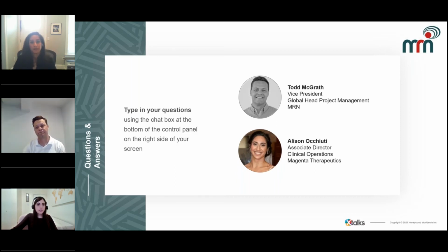A question that we have here for our speakers is: is reconsent required when decentralization services are integrated with an ongoing clinical trial? I can take that. If it's not already in your informed consent form, then yes, absolutely, reconsent would be required. And that's something we talked about earlier: that process is not instantaneous. There are a lot of steps to getting a new consent form approved and then getting it signed. So it's something to plan for upfront if you can.